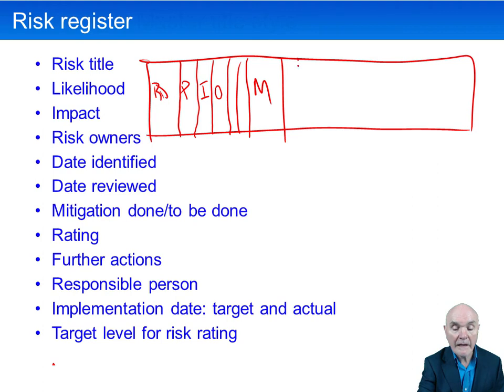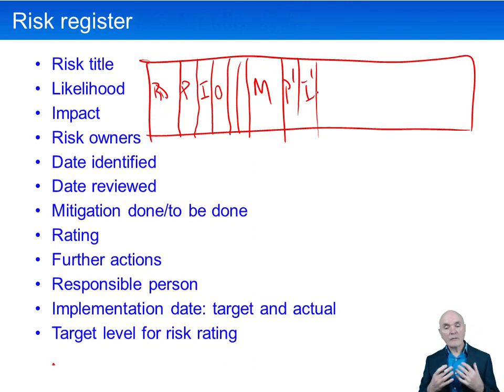Quite often what it has afterwards is a new P and a new I. What is our risk exposure after we put in these mitigation measures? What is now the probability of it going bad? What is now likely to be the impact on us if this debt, presumably a smaller debt, does go bad?